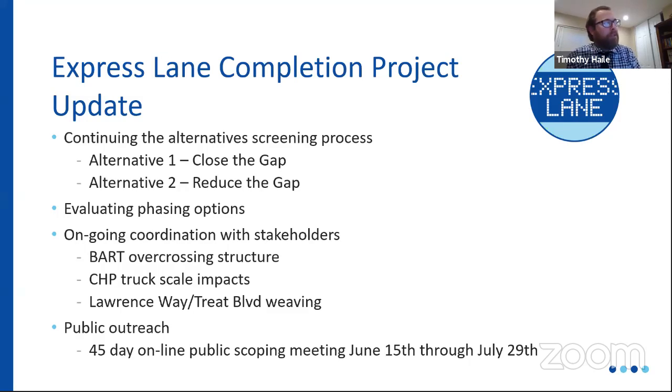We also are, you'll hear more about this later in the agenda, but we are also out doing public outreach with a 40-day online public scoping process because we are doing an environmental impact report for the California Environmental Quality Act, which is called CEQA.